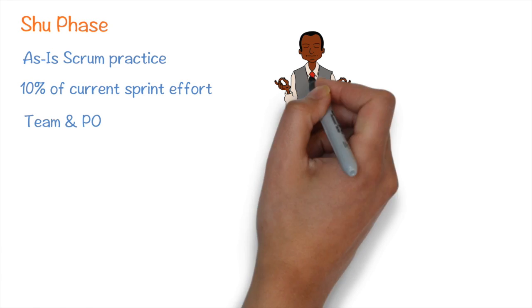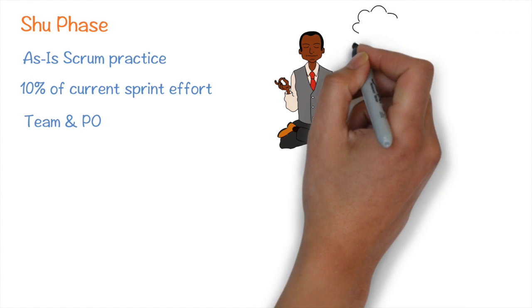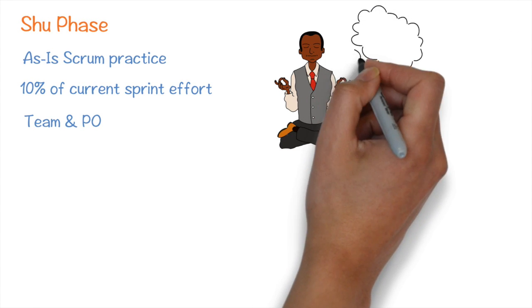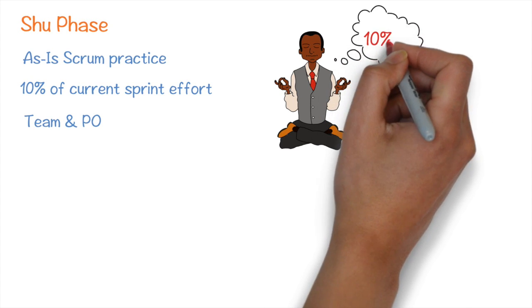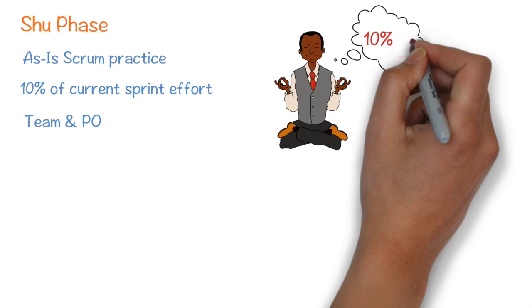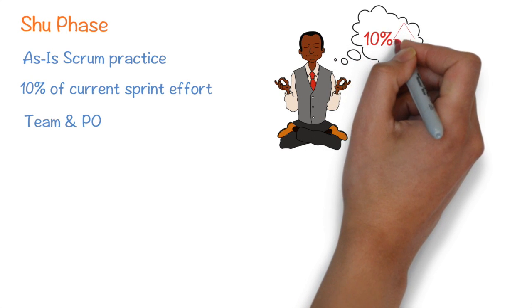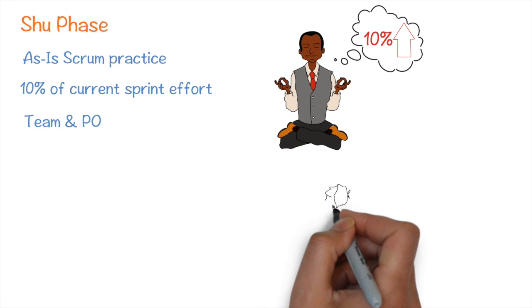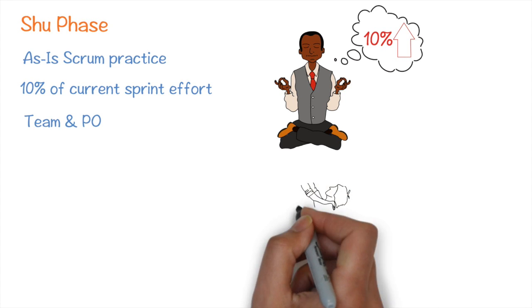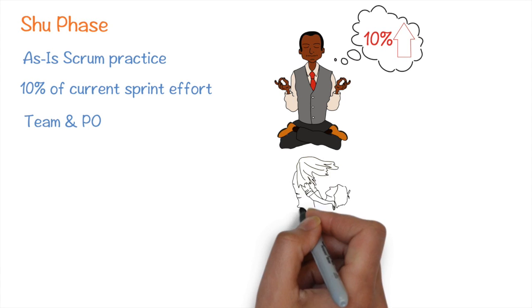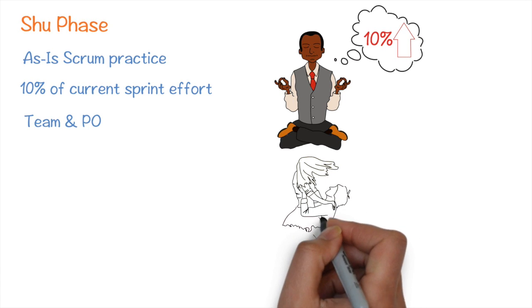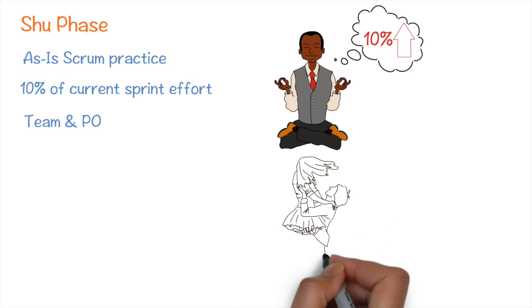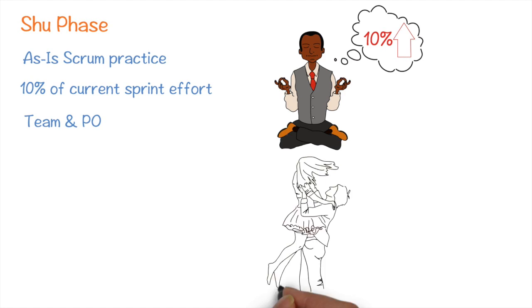Trade Bull, from their past sprint experience, realized that they couldn't do justice to the backlog refinement with just 10% of the sprint effort. Also, over a period, one of the Trade Bull members learned from his girlfriend who works in a different team that they were inviting the maintenance team for backlog refinements, so as to help derive maintainability requirements.